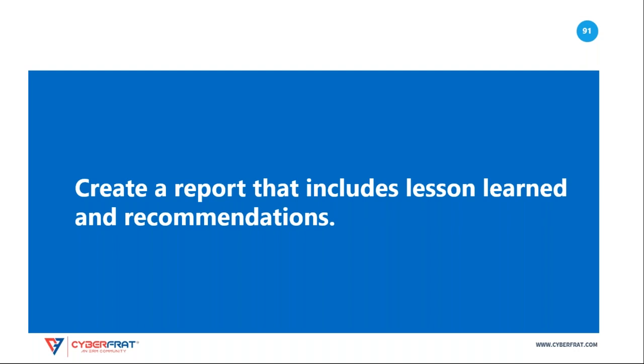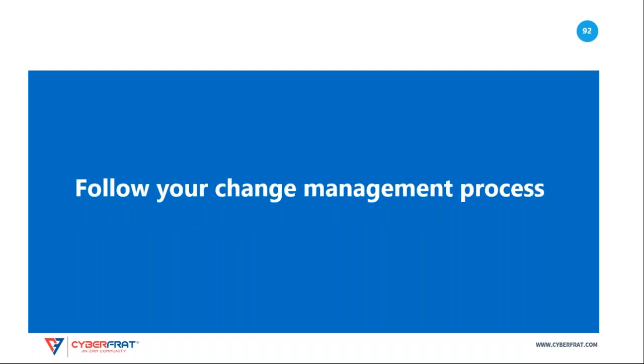The lessons learned facilitator should work with the team leader to document the lessons learned in a report that includes suggested process improvement actions. As you make the improvements identified during your lessons learned process, remember to follow your organization's change management procedure and to update your incident response plan as needed. You want to make sure that all of your changes are appropriately tested, approved, and documented.